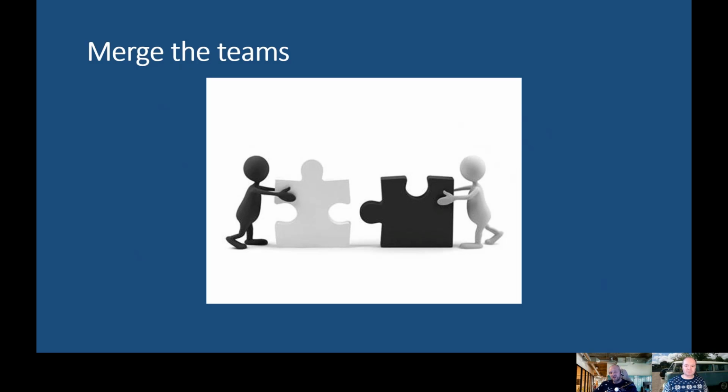In addition, our manager has decided that the development team lead will become the Scrum Master and the operations team lead will be the product owner. Now, for those of you who don't know, a product owner is responsible for translating business needs into workable backlog items for Scrum sprints, which means they must speak to stakeholders at various levels within the business. In addition, they are ultimately responsible for prioritizing those work items, even though they may get input about those priorities from various stakeholders. And the Scrum Master's role is to empower the team to do those backlog items by encouraging how they work and removing any impediments when they appear.